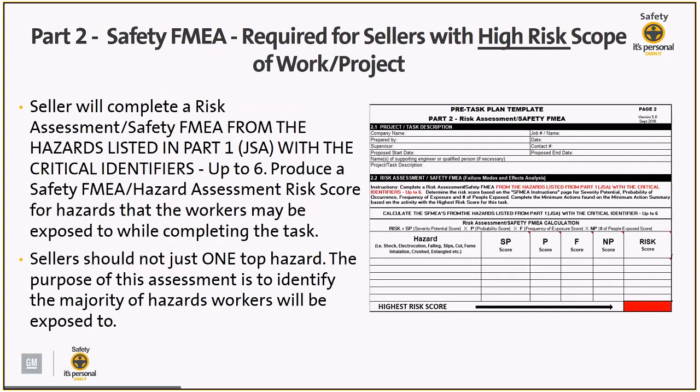So when you look at safety FMEAs, what is required for sellers with high risk scope of work? We're looking for the seller to complete the risk assessment, safety FMEA, from the hazards that they have listed in part 1 of the JSA.